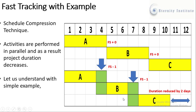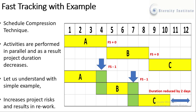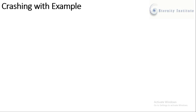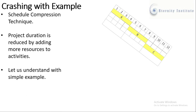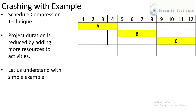In this way our duration is reduced by two days. Similarly, when we do fast tracking it increases the project risks. Now let us consider crashing. Crashing is also a schedule compression technique, and in crashing the project duration is reduced by adding more resources to the activities.